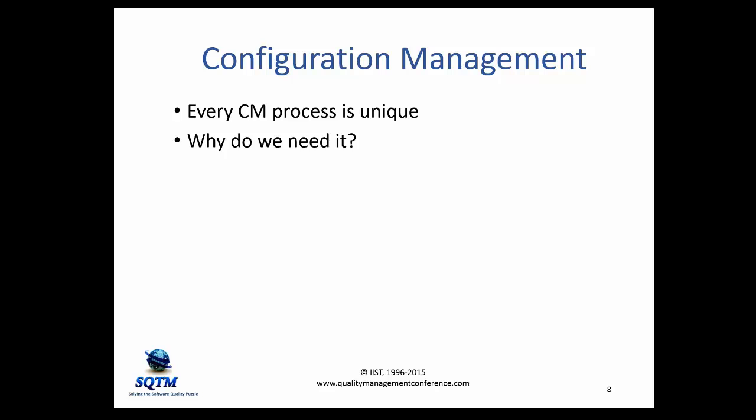Why do you need it? You need it because you need one central group to manage the configuration items, the changes, and the version control on your software and your configuration items. And configuration items are more than what most people think of. The test plan, the test scenarios, the test scripts, those all are configuration items and should be under configuration management control.